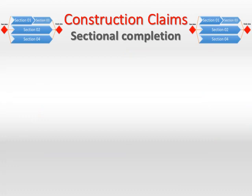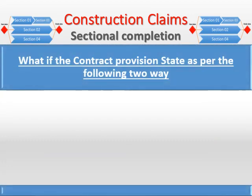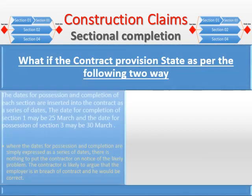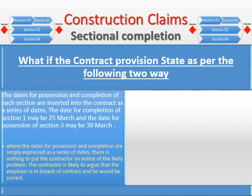What if the contract provisions state as per the following two cases? In the first case, the contract provisions state that the dates for possession and completion of each section are inserted into the contract as a series of dates — for example, the date for completion of section one may be 25th March and the date for possession of section three may be 30th March.